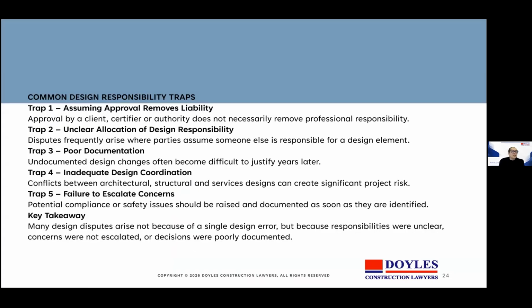So what are the common design responsibility traps? Trap 1, assuming approval removes liability. Approval by a client, certifier, or authority does not necessarily remove professional responsibility. Trap 2. Unclear allocation of design responsibility. Disputes often arise when parties assume someone else is responsible for a design element. Trap 3. Poor documentation. Undocumented design changes often become difficult to justify years later.